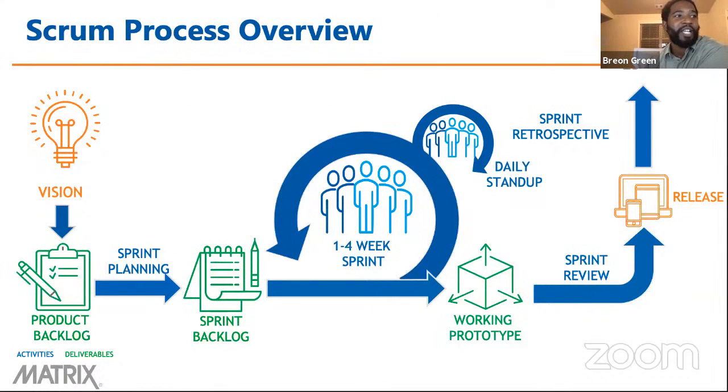And here's the final slide where we talk through the Scrum process in general. With Agile, we perform the different Agile ceremonies. So we'll have one to four week sprints, daily stand-ups that act as a way for us to quickly resolve any issues that may have come up, define any stories that need to be prioritized, and really discuss what changes need to be made before our review and our retrospective.